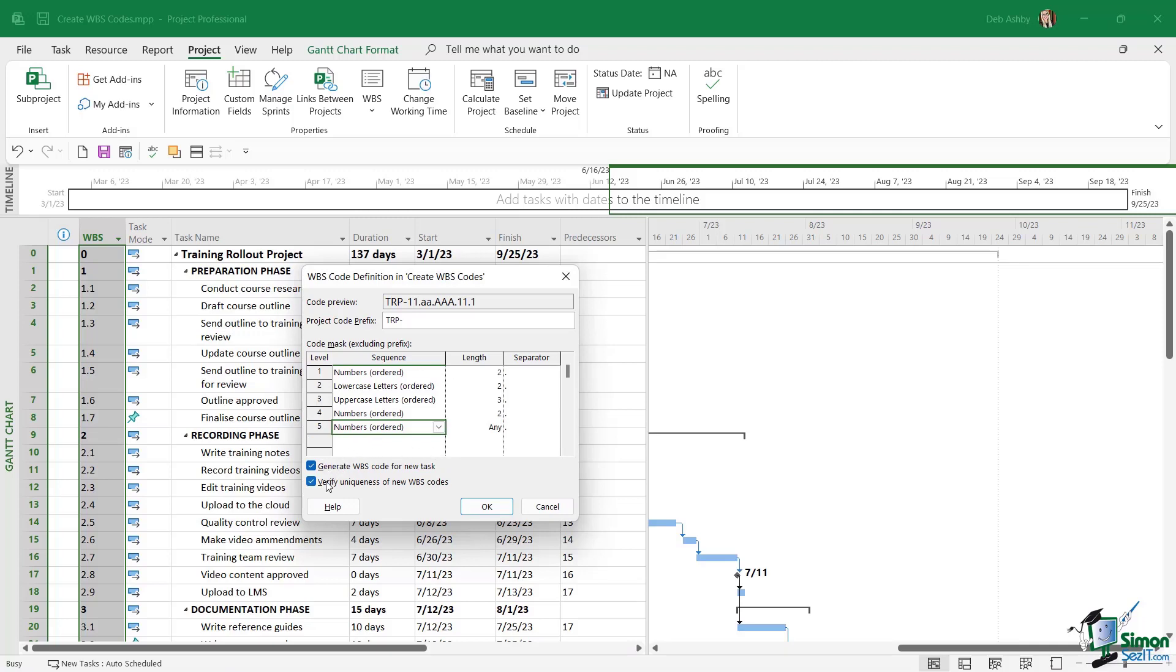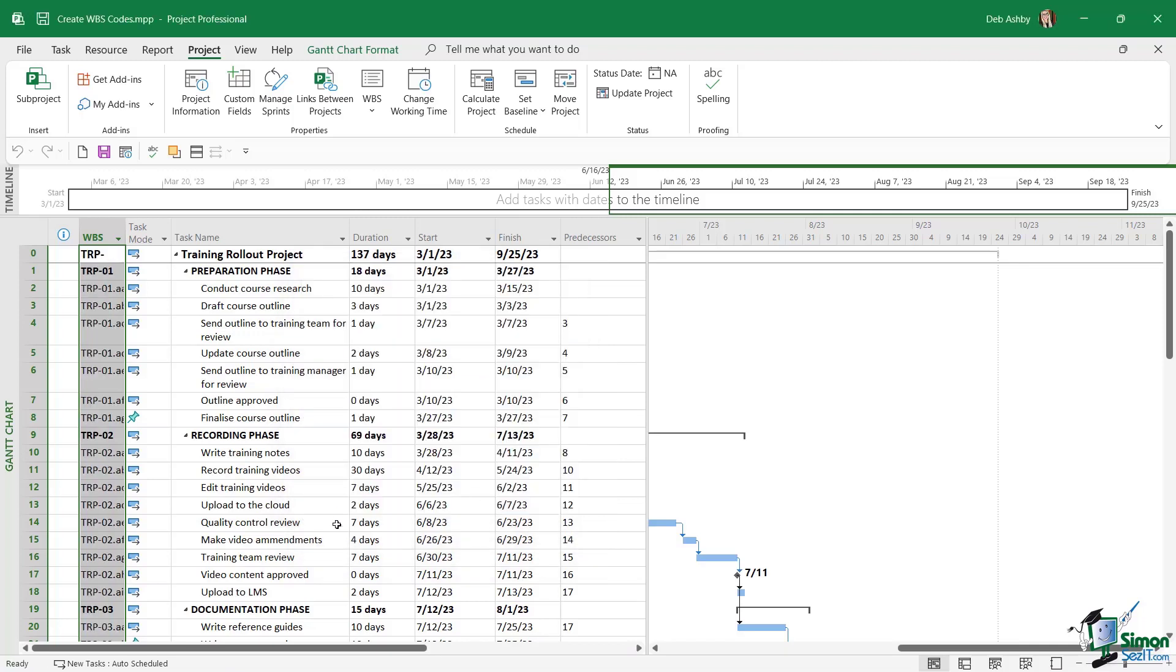We want to make sure that we keep these two check boxes underneath selected, because it means it's going to generate a new unique WBS code for any new tasks that I add into the project, and it's also going to keep checking that the WBS codes that are being added are unique. So let's keep those checked, click on OK.